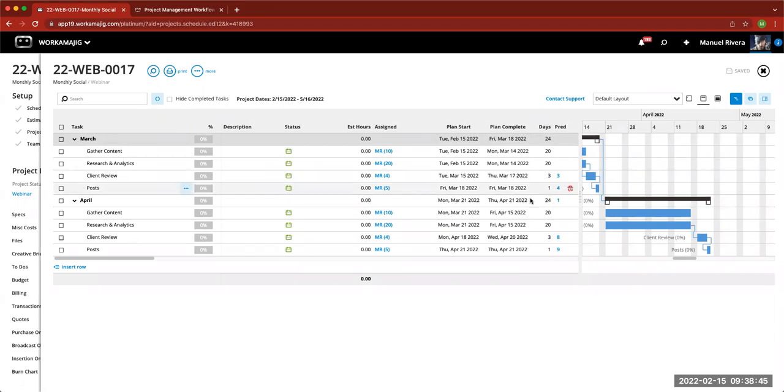And again, we won't get into so much of the discussion of the setup here, but the idea is that I've set myself up so that if we're having a social media campaign that runs through various months, I can go ahead and pull these tasks from a template that maybe just has the breakdown or the basics for 1 month, and just copy over the different tasks or the repeated tasks as follows, right, for the number of months that I'm going to be running it for.